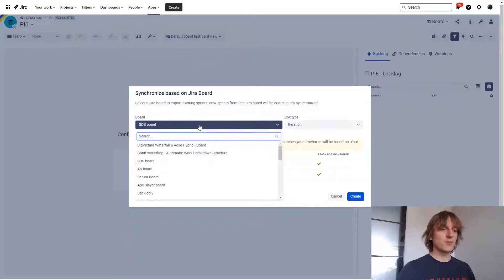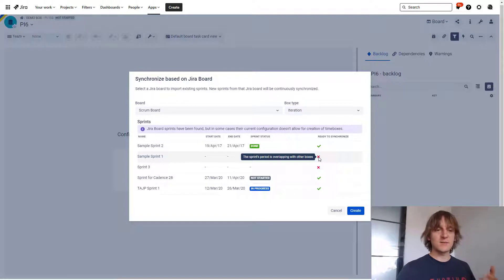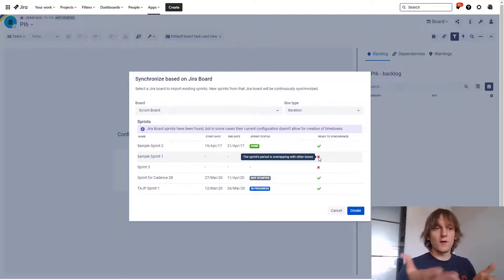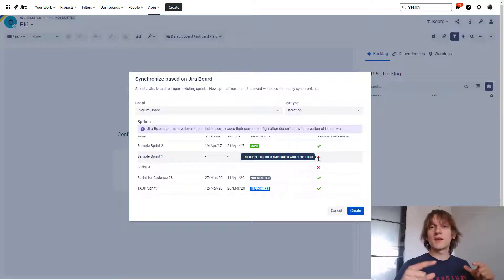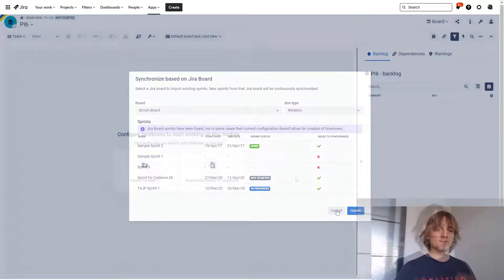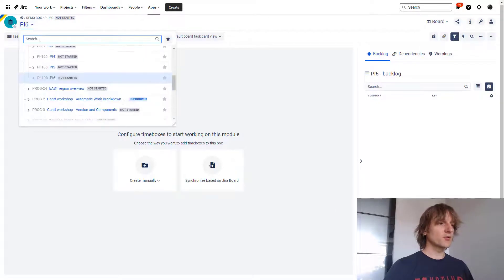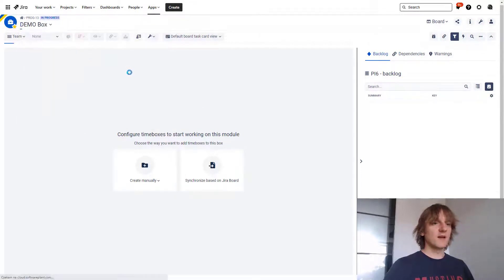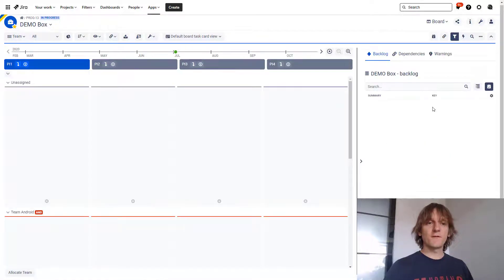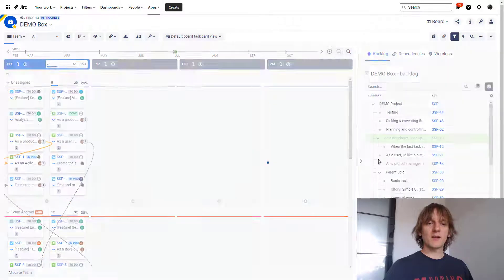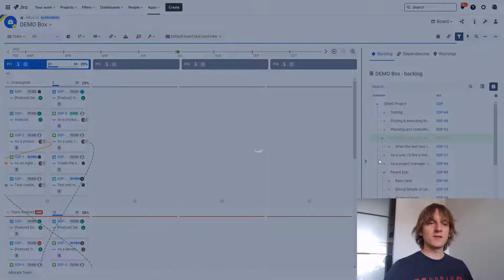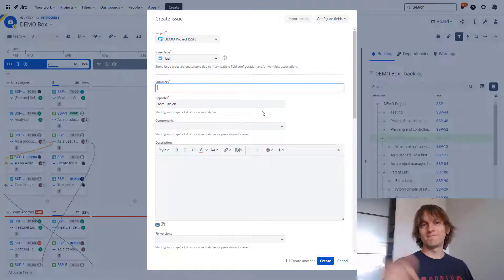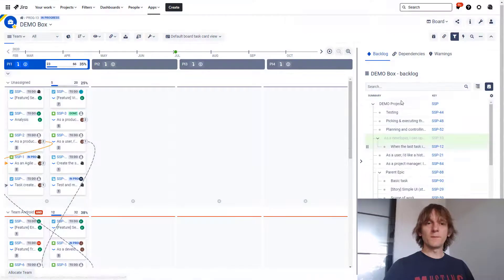It might happen that the board, for example, will have sprints that will not be possible to synchronize like that, but you will also get a nice explanation. 'The sprints period is overlapping with other boxes,' and apparently the box settings of the iteration—yeah, that's exactly how it is set in my instance—don't allow for overlapping. So for these sprints, the boxes cannot be created. Makes total sense. Another thing that is available here on the board module, let me switch to my demo box again, is the inline creation of tasks from the backlog. So on the right-hand side, you have the backlog information. If you click over here now on this plus sign, you will see a standard JIRA issue create window that will allow you to add a new task to the box.